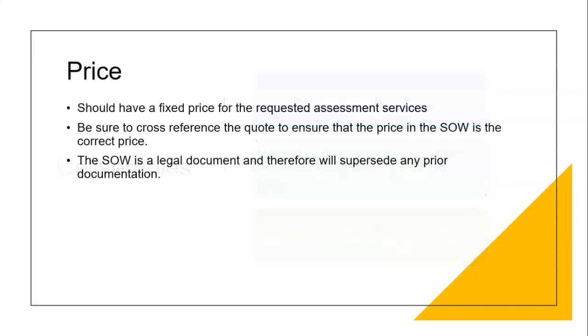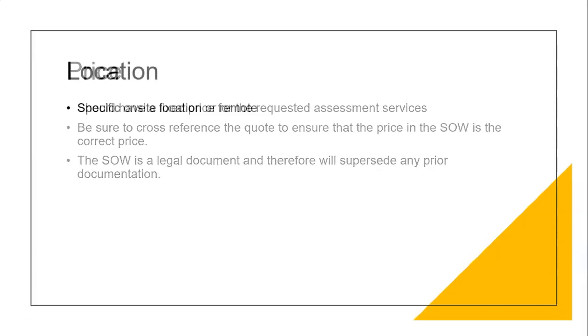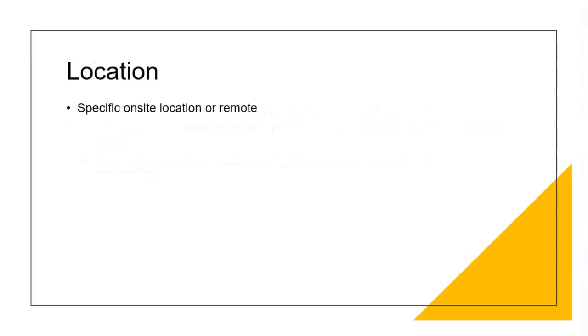Pricing. You should have a fixed price for the requested assessment services. Be sure to cross-reference the quote to ensure that the price in the statement of work is the correct price. The statement of work is a legal document and therefore will supersede any prior documentation. Location. If you have to travel, you need to annotate it inside of the statement of work. And if you don't, then you may end up paying for that out of pocket.